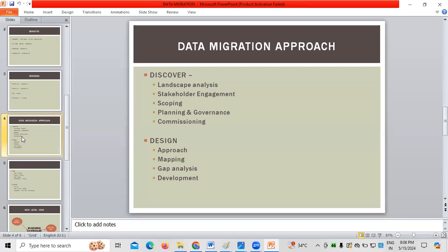Now, how we use these people is what stakeholder analysis and management stands for. For example, if any change in requirements happens, being a business analyst, you must know whom you need to interact with. This all has to be planned before, not at the time, because at the time it leads to confusion. To reduce this complexity, everything has to be planned before. That's what we call stakeholder analysis and management. This all comes under the stakeholder engagement part.